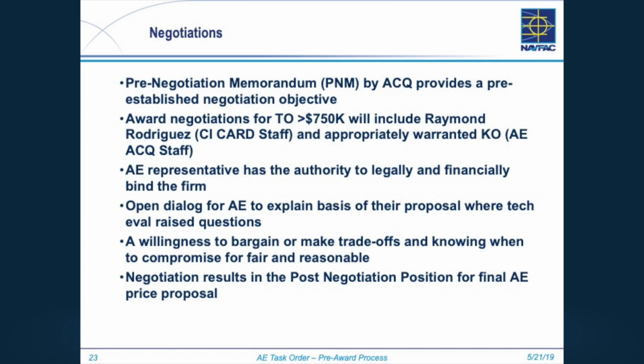Once you get through the tech eval process and your 1102 is in agreement with everything and has no questions, which hopefully is an easy process if you've explained, this is different than what I thought, then the Stephen staff is going to be writing up the pre-negotiation memorandum. They actually write up a document that gets signed by Stephen or someone up there in order to be approved to go to negotiations.